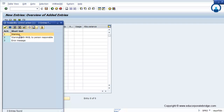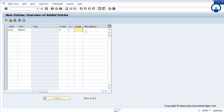First of all, you need to set the warning message. In normal industry practice, you can set 80% as a warning message, 90% as a message with a mail, and at 100% it will straight away give an error message. But as per your business or industry requirement, you can set your own tolerance limit.